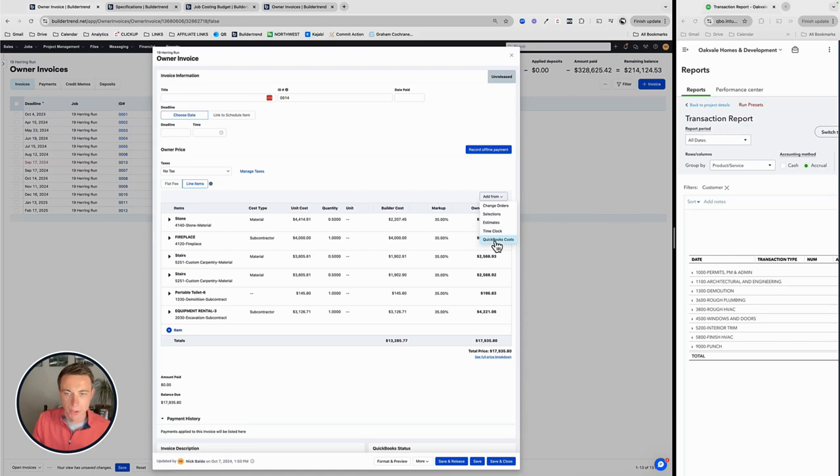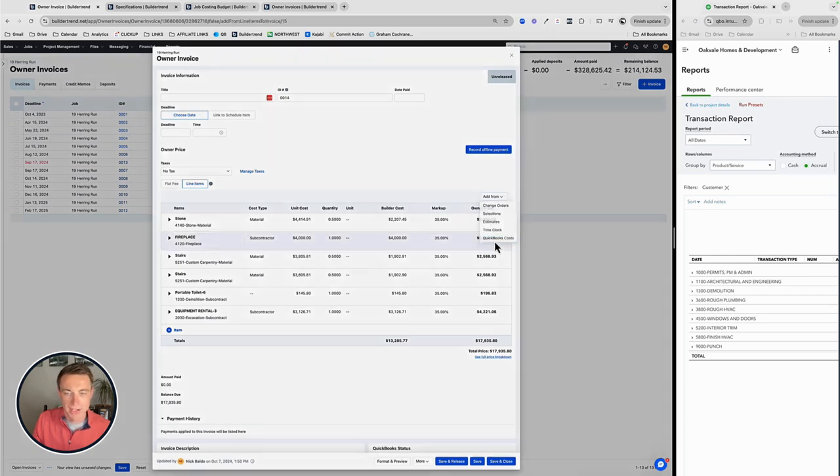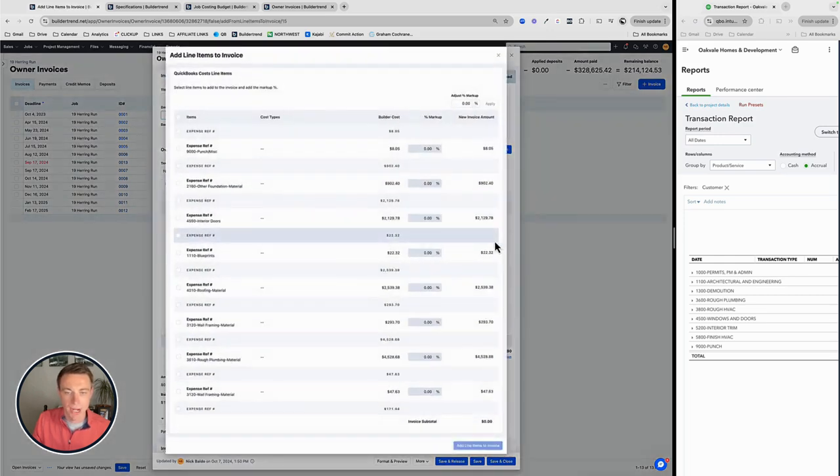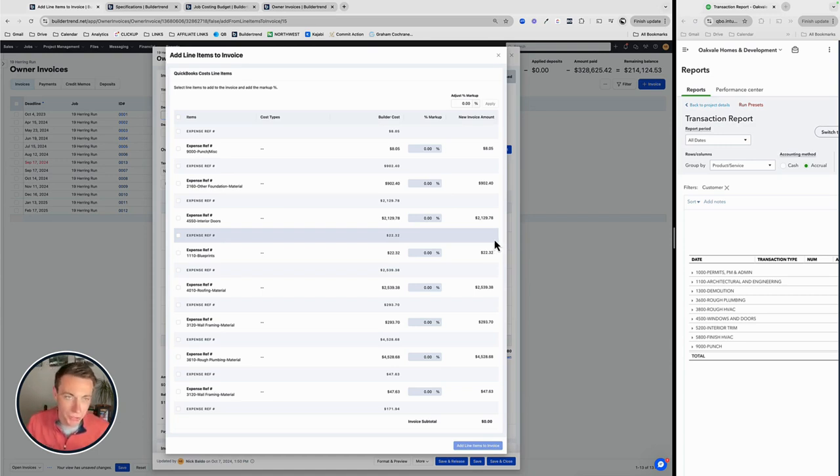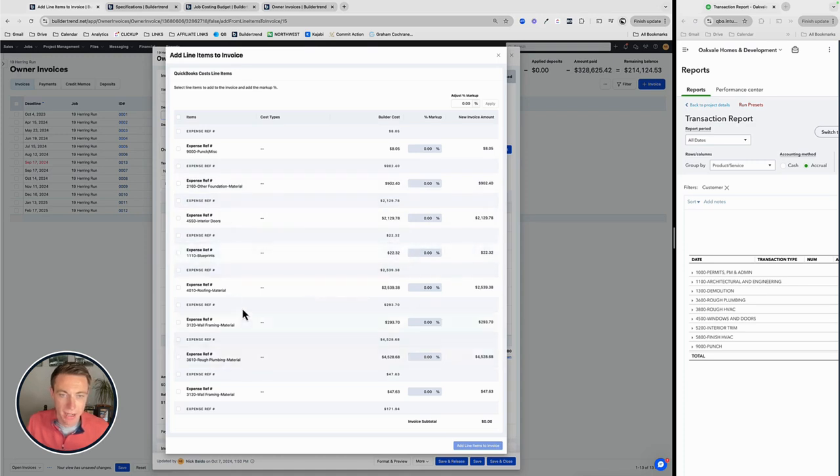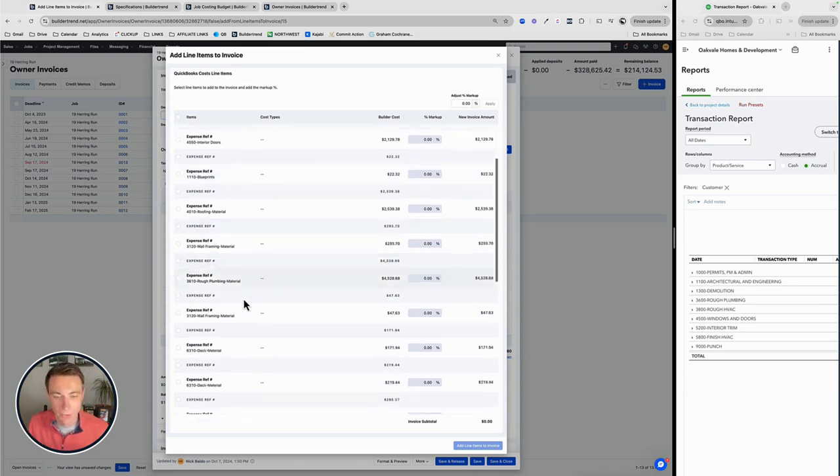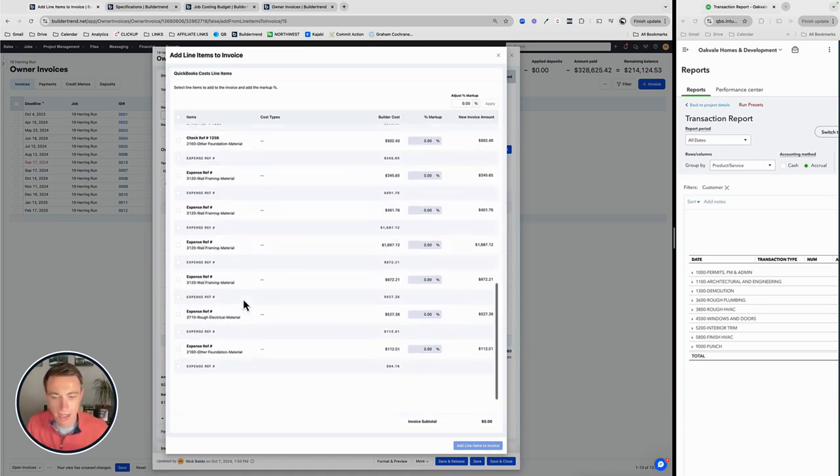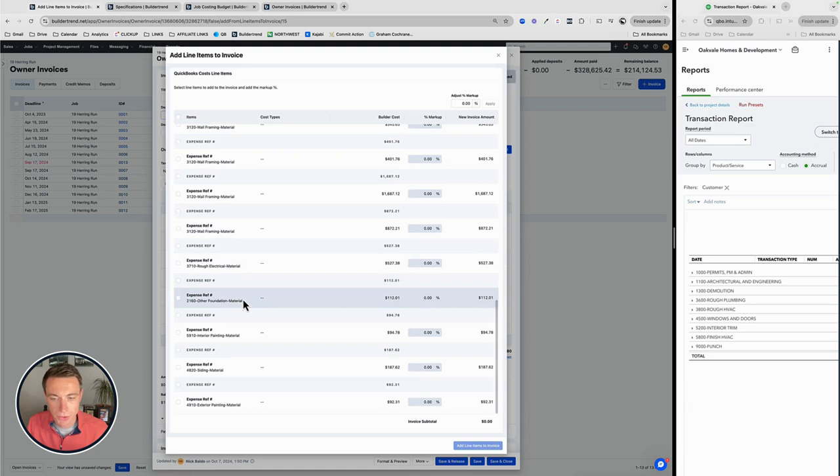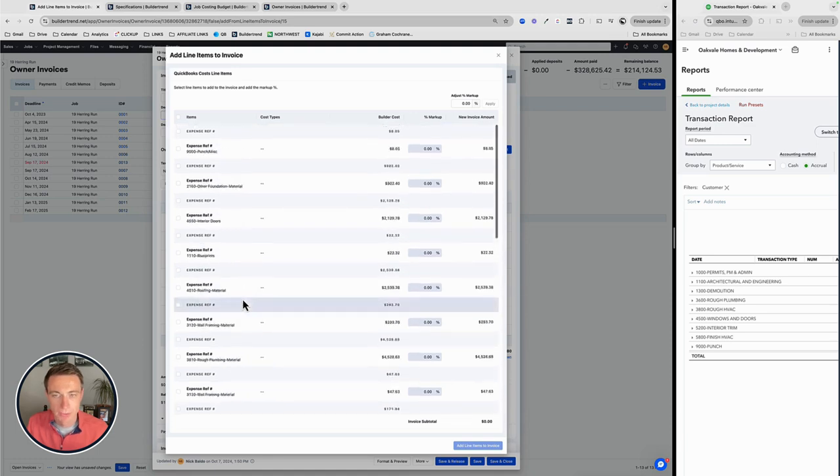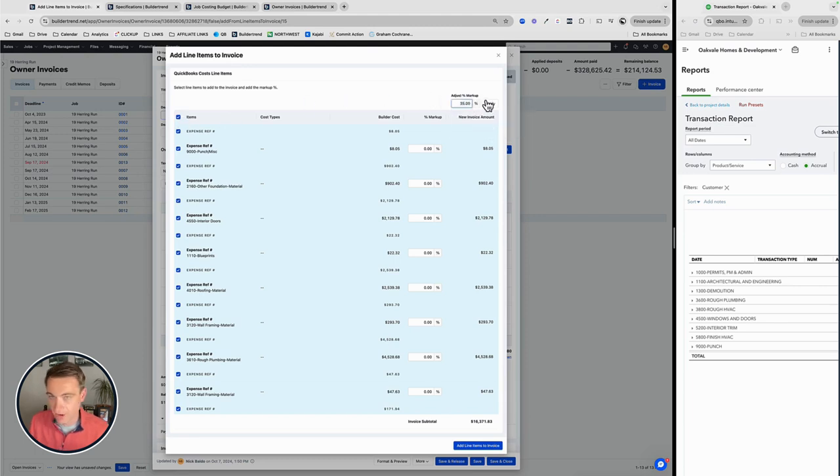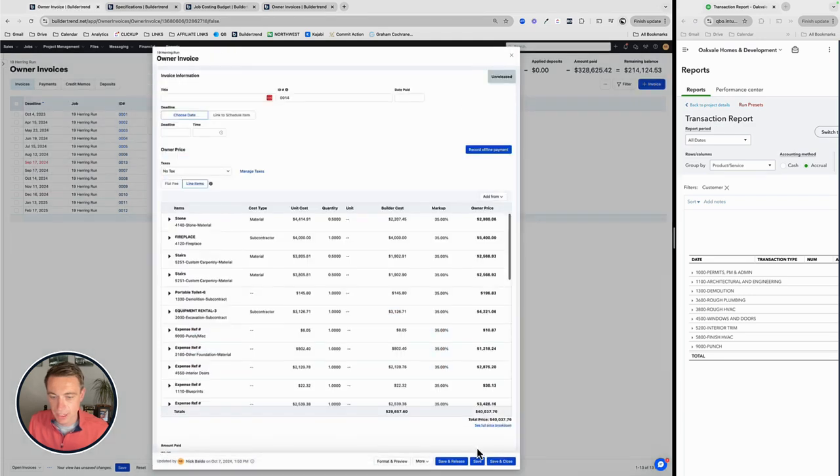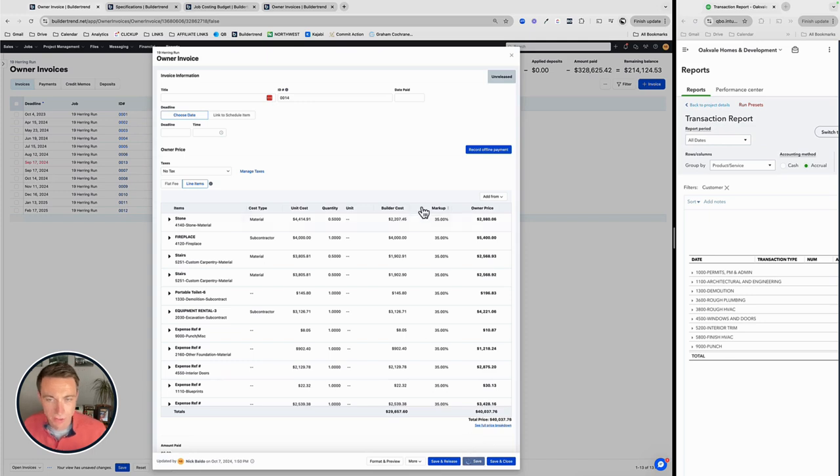Next, what I'm going to do is QuickBooks costs. These are costs that come directly in from QuickBooks. We want to link up with QuickBooks and we want to link to project and to cost code. So these are expenses that come through for whatever reason we decide to use them within QuickBooks, as opposed to within BT itself. And again, because of my 35% standard markup, I'm going to select all of these. I'm going to do a 35% apply that there's my $22,000 total. I'm going to add those line items to the invoice. And again, well on my way to a really strong invoice.